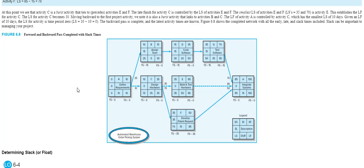But notice that in the backward pass, the latest that could start was 25 units. We calculated the 25 from the 30 minus 5. So if you subtract 25 from 10, you have 15. Notice that B has 15 in the middle, the left-hand middle row, whereas C has 0. Here's what this means.